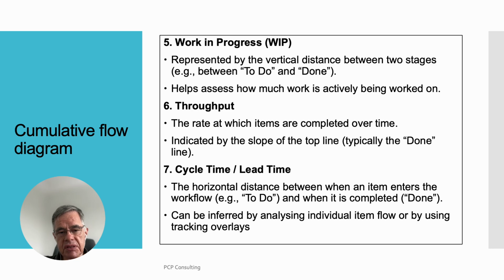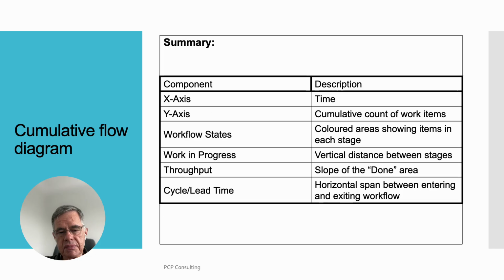Cycle time, lead time. The horizontal distance between when an item enters the workflow, for example to do, and when it is completed, done, can be inferred by analyzing individual item flow or by using tracking overlays.